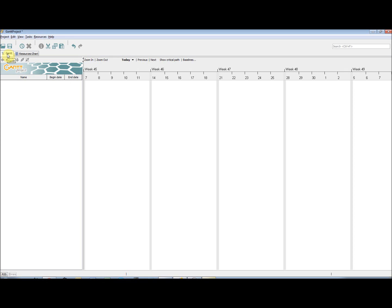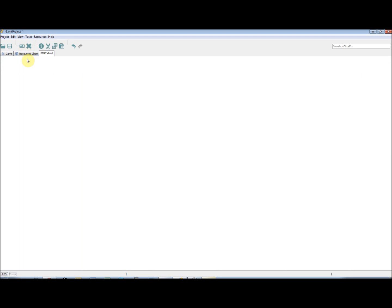The PERT chart tab can be shown by selecting View, PERT chart. This will add a new tab next to the Resources tab that shows a PERT chart of your project.